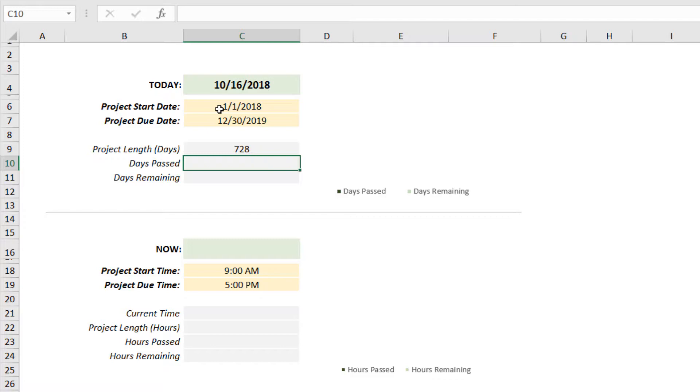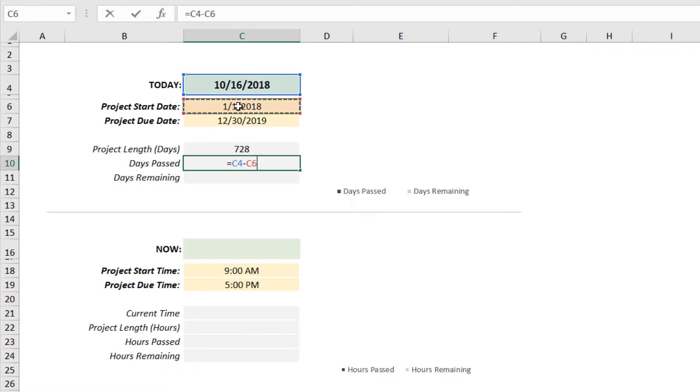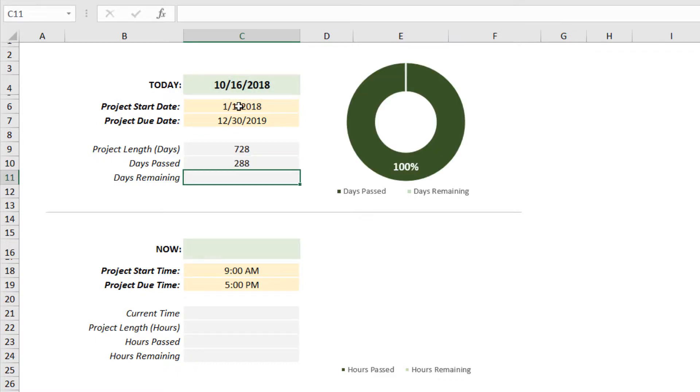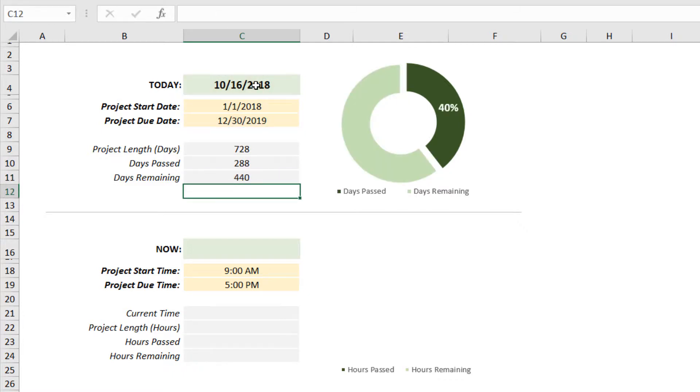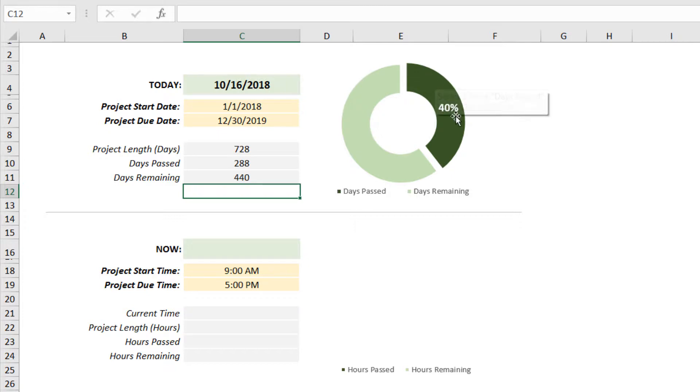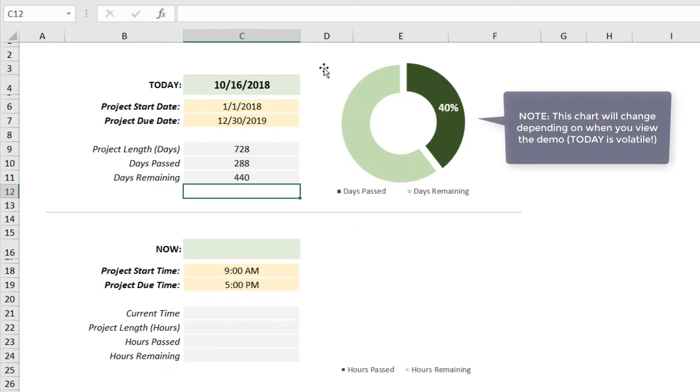Same logic for the other formulas. Number of days that have passed is today's date minus the project start date, C4 minus C6. Days remaining is the due date minus today's date, C7 minus C4. When we press OK, you'll see this donut chart populate, which tells us you're 288 days into this project—that represents 40% of the entire project timeline. Good way to keep a pulse on progress, especially for long-term projects like this one.